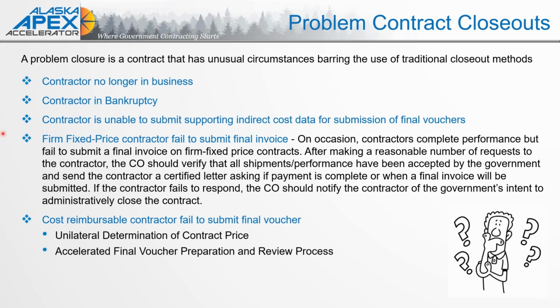The number one area that I hear from contracting officers all the time when they're trying to close out contracts is that the businesses fail to submit the final invoice. And I probably get one or two a month from the contracting officer. We work a lot with the Forest Service, where that small business has moved on to their next contract and they're not submitting.